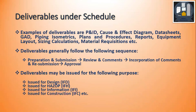There are many deliverables under the schedule which we cannot all list, but a few examples include: P&IDs (Piping and Instrumentation Diagrams), cause and effect diagrams, data sheets (process data sheets, mechanical data sheets), general arrangement drawings (piping GA drawings, tank GA drawings, storage tank GA drawings), piping isometrics, plans, procedures such as commissioning and pre-commissioning procedures, reports, equipment layouts, sizing calculations, and material requisitions.